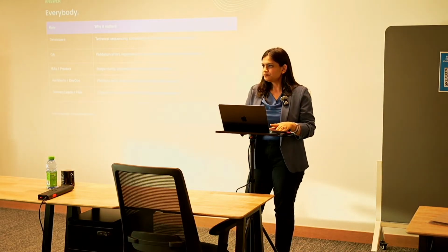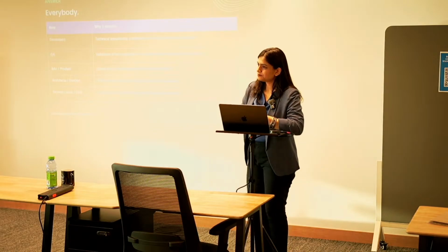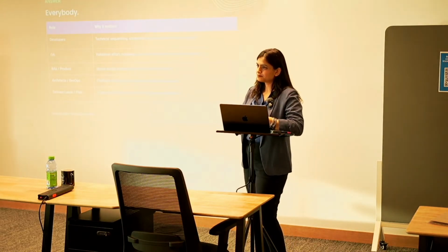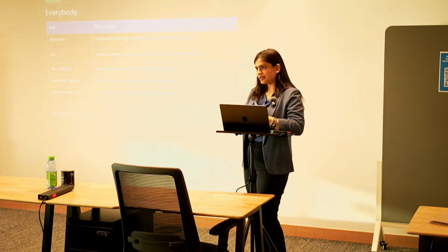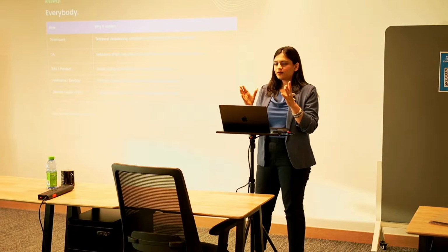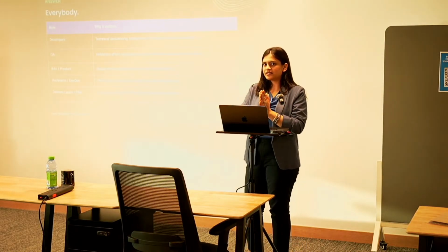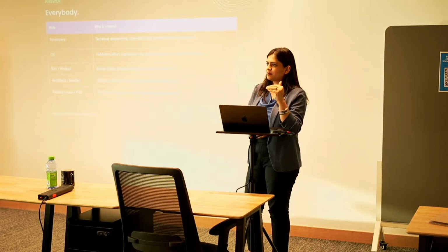So, when we think of release planning, something should be my source of truth to start with, right? Something is the starting point for me. That is after the backlog, whatever prioritization I have, based on that, I create my release plan. Correct. Yes. So if you're only talking about the point of creation of a release plan, the prerequisite for that I would say is a prioritized product backlog.